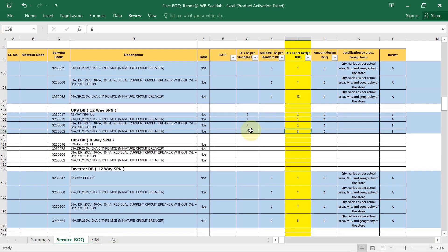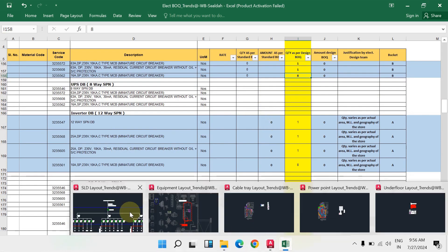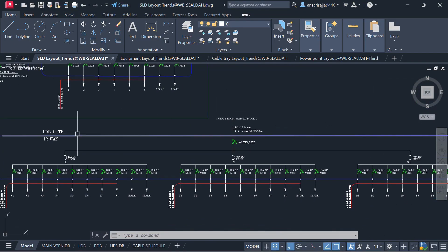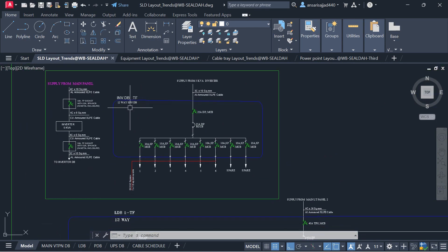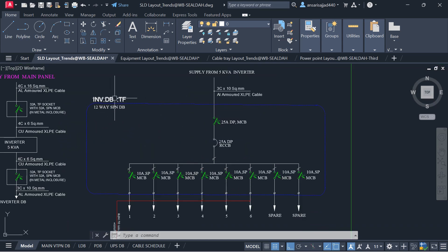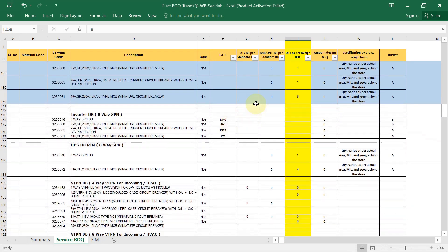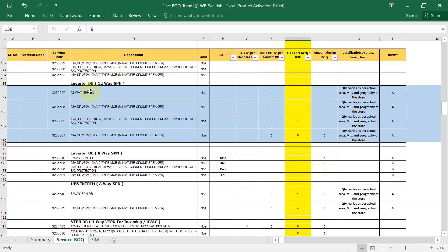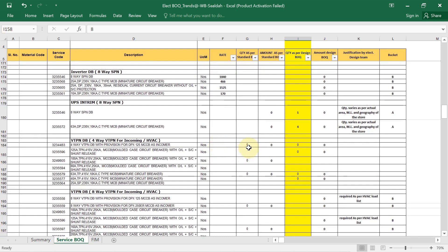For the inverter DB, open the SLD to find it. We have a 12-way SPN inverter DB. Fill in the detail: how many double pole MCBs you are using, their quantity. In our case we are only using the 12-way inverter SPN DB; we are not using the 8-way, so leave that as it is.